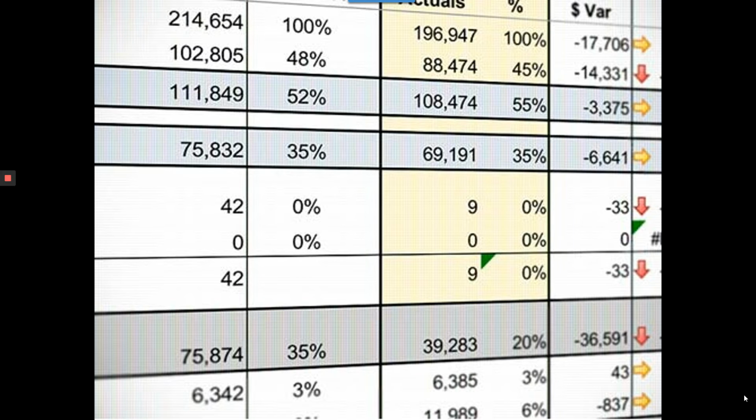So when we do cost estimating, we provide variance reports from one design to another design so you can see what changed. And it's the architect's recommendations to the owner to adjust the project size or the quality of the design in order to get those adjustments back into the owner's budget. So the designer now takes a more proactive role in assuring that the cost estimates match the owner's budget, and that's where we come in.